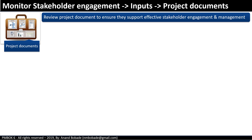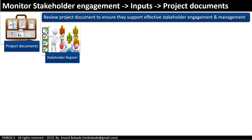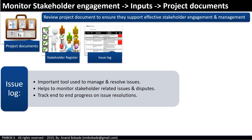Under project documents, the stakeholder register helps identify all stakeholders, which is a requirement for monitoring stakeholder engagement. The issue log is an important tool used to manage and resolve issues — it helps the project manager monitor stakeholder-related issues and disputes and track end-to-end progress on issue resolutions.